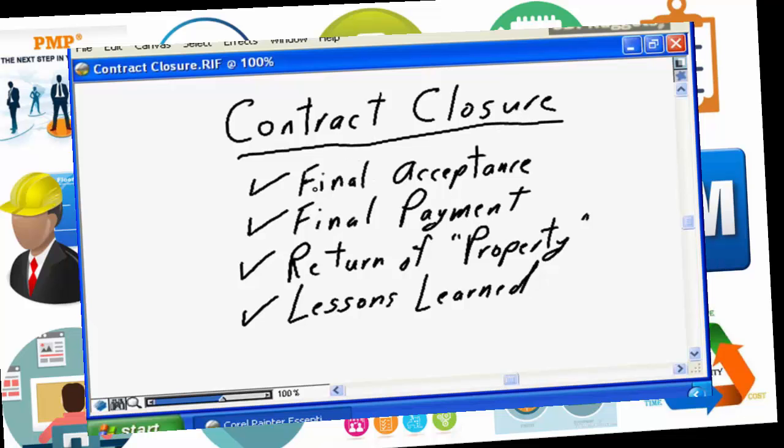You will relieve your company of any future obligations by having that final acceptance document signed and by putting in process the proper steps for final payment and release of warranty support, release of holdbacks. It will ensure that it is a good experience between both companies, and both companies will be willing to embark on contracts in the future.